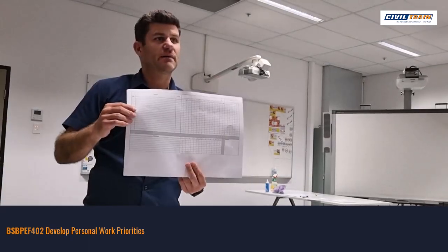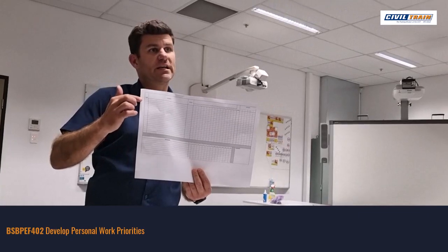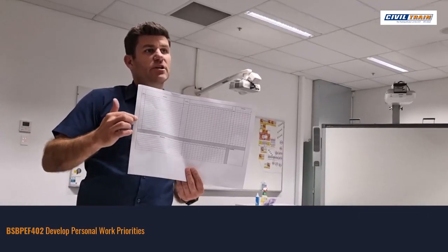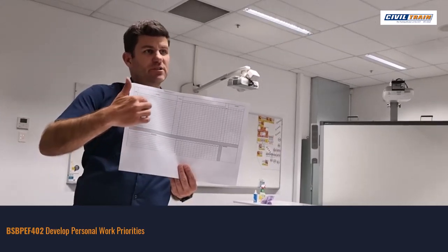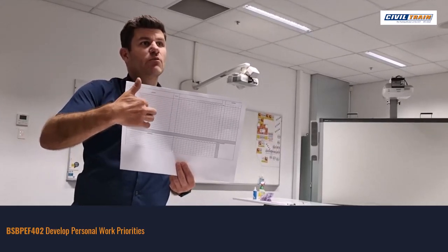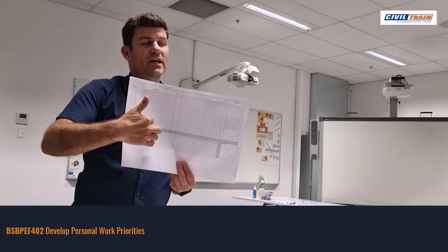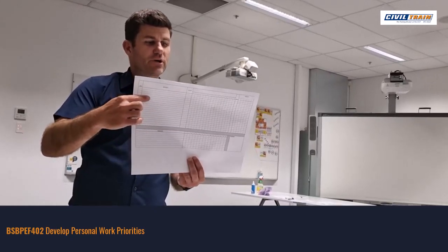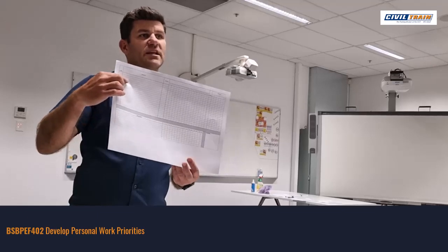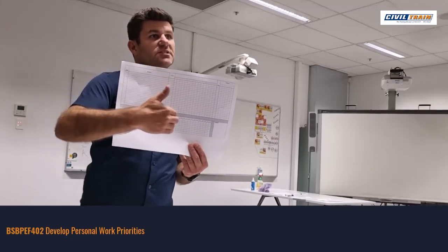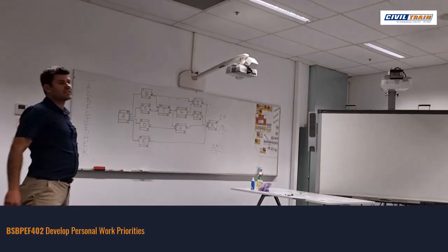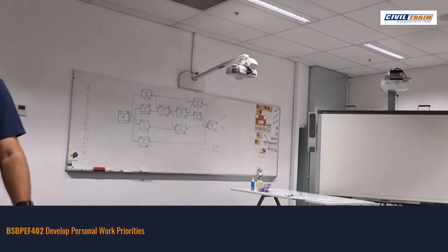The cascading number sequence. Yep. So we're going to put on the left hand side, in the can, number 1 to 11, and then we're going to put the corresponding activity, which is a letter, next to that new cascading number. The next box across, I believe we put in the duration, and then once we get to that point, I'll explain the next steps of colouring in the squares. But as you can see, we've got that new cascading sequence calculated using that critical path method.